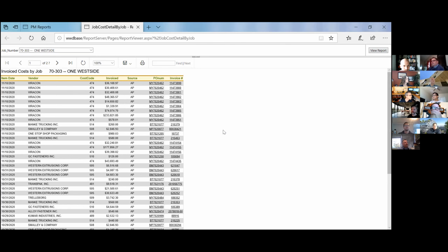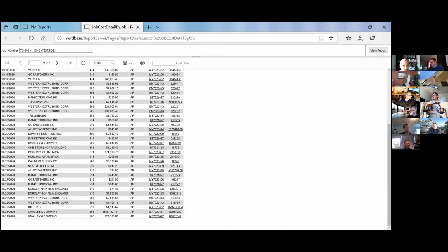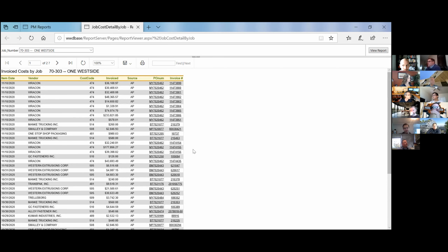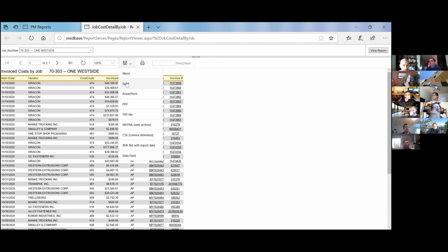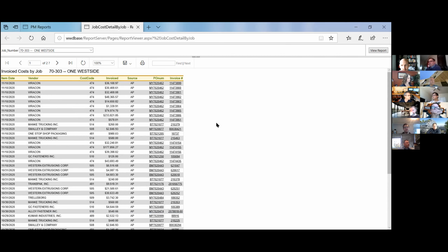And so let's say you're billing for November, and you probably did your October billing, you know, October 8th, 9th, 10th, somewhere in there, right? If you know what that date is, you can come down. Well, Tom, I think first you change it into an Excel spreadsheet, right? So you can kind of check the dates. Yep. So what you can do up here, drop down, Excel. So it puts it into an Excel form, if everybody can still see that.